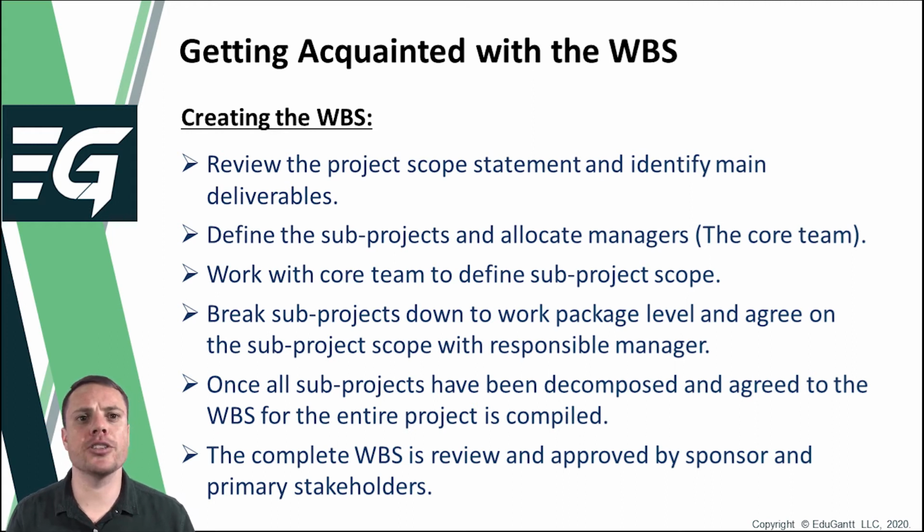The project scope has therefore been thoroughly defined in collaboration with the stakeholders, and further planning is now required to start determining how the identified deliverables will be created. The time has now come to start putting together the core project team as well. The work summarized and documented in the project scope statement is therefore examined, and the main deliverables or main areas are identified. These main deliverables typically make up the sub-project level of the project breakdown.